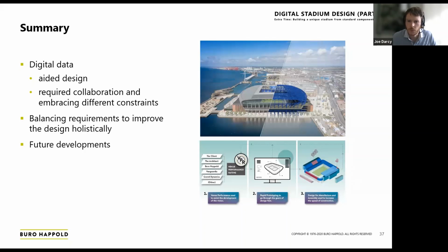I see there's a question or two that's come through. One from John McGovern, who's on the call from Laing O'Rourke: DFMA facade elements improve certainty of envelope completion with greater quality, using factory manufactured elements delivered and assembled much quicker than traditional hand-laid brick.